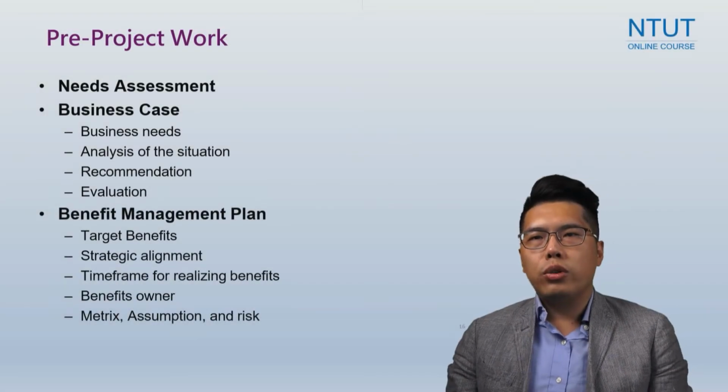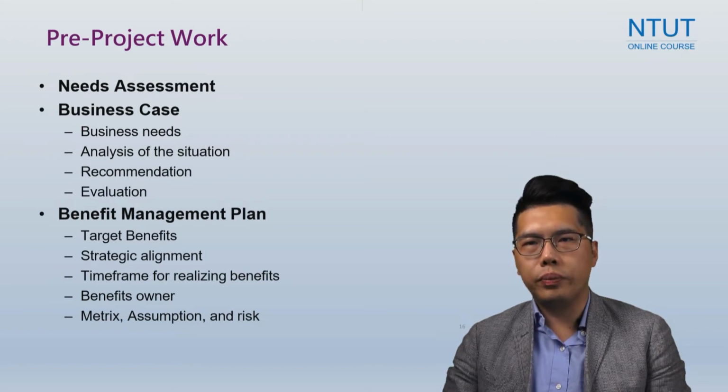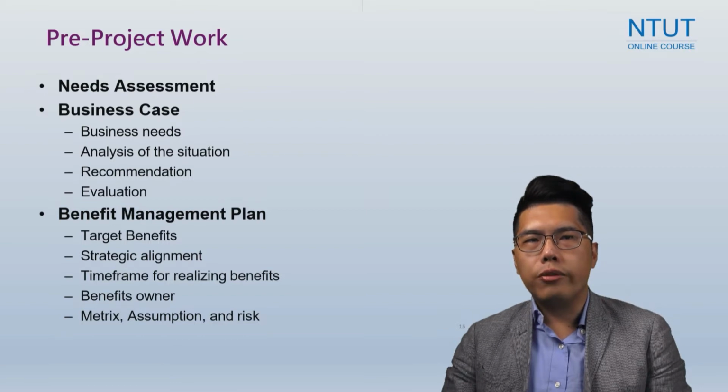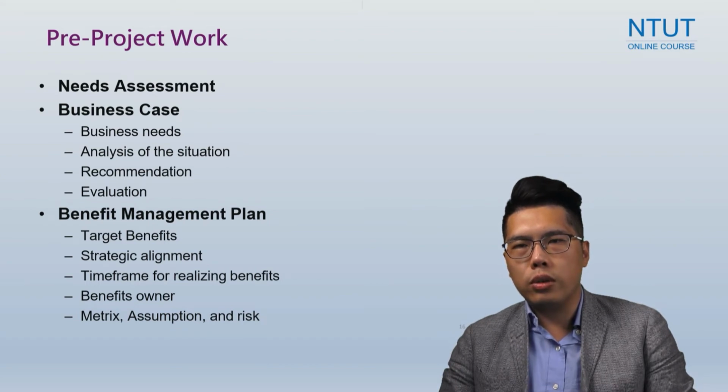So in the pre-project work, the project has to carry out the needs assessment, business case, and a benefit management plan. So first, the project needs to clarify the needs in the project, which usually the project manager has to talk to the stakeholders and also the clients as well. And second is regarding the business case.